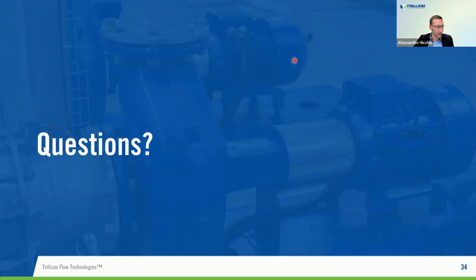Another question for you, Barry. What's the typical lead time for a re-rate project? The re-rate project would itself predominantly take place in parallel whilst the pump was still operating. So that could be anything from 6 to 8 months. When it goes off-site to the platform, then that would be a period of maybe 2 to 8 weeks for the implementation in the platform. But the pump is still kept running whilst that's taking place.